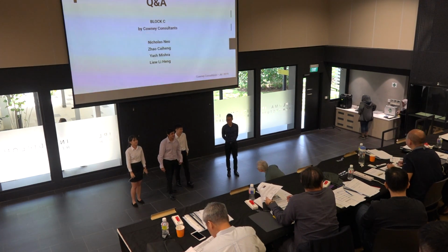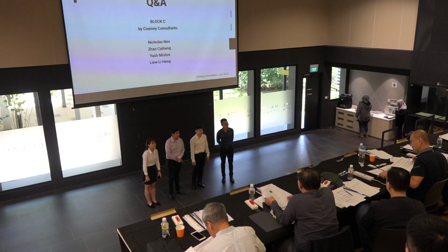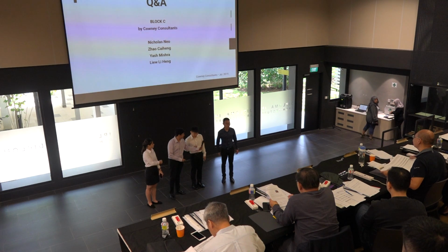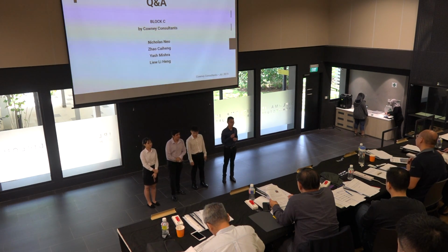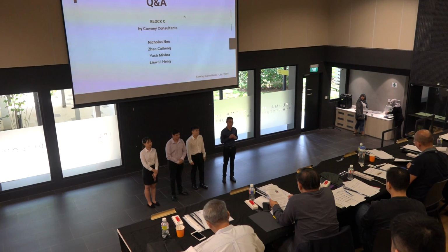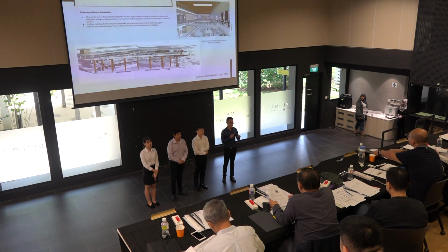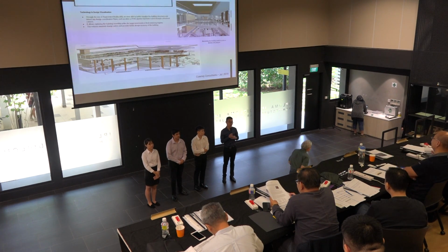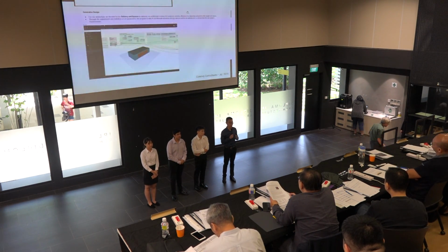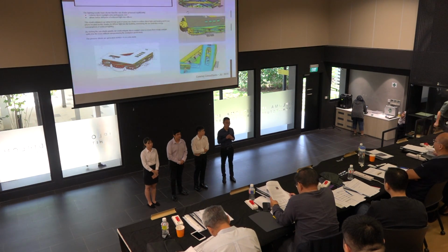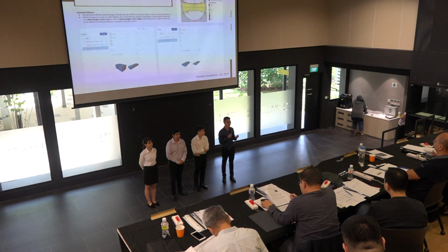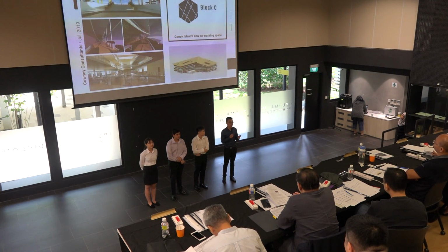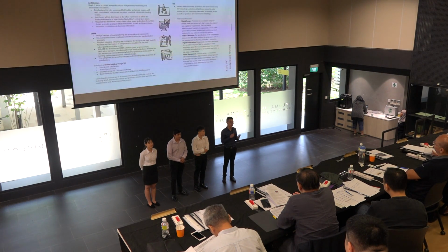Yes, sure. So primarily for our building, we identified that PPVC couldn't be used very extensively, because there's very little potential for repeating units. So in terms of construction, we are primarily using precast. But in terms of PPVC, we do have repeatable units. I mean, we have our lift shaft, our stairs, our toilets. So all these units are PPVC.